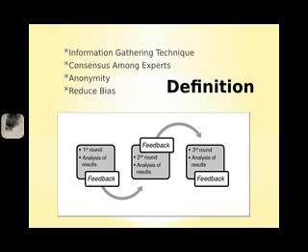This is completed through a facilitator and the use of a questionnaire that solicits information from experts regarding crucial project points. The responses provided by the experts to the questionnaire are summarized and then recirculated to the experts for further comments. A few rounds of this process are completed in order to reach consensus. The circulation of expert feedback helps to reduce bias in the data, and it keeps any one expert from having undue influence on the outcome.